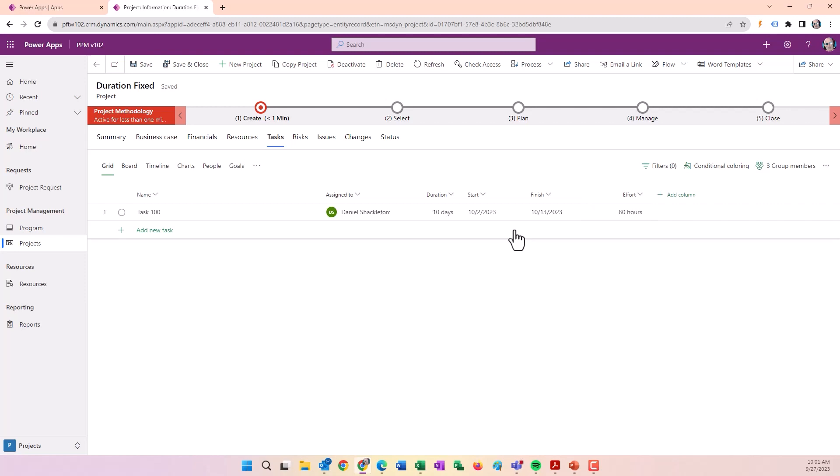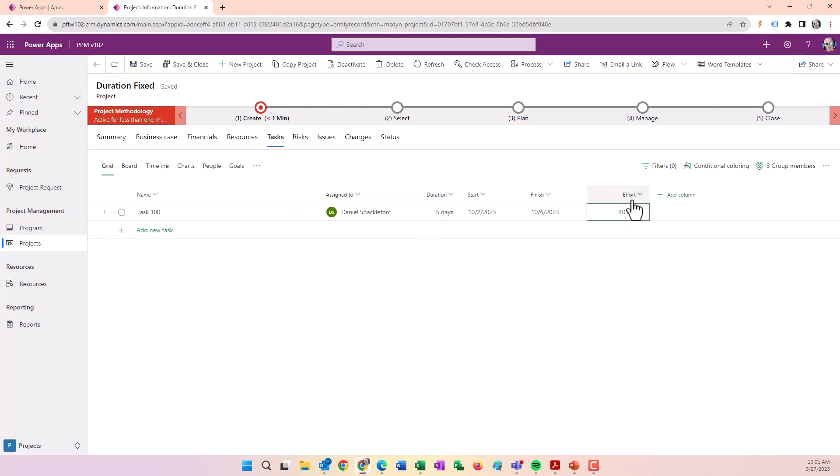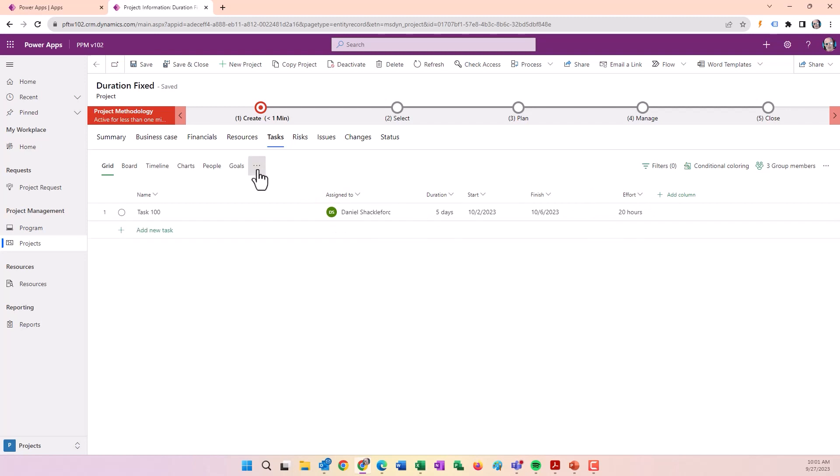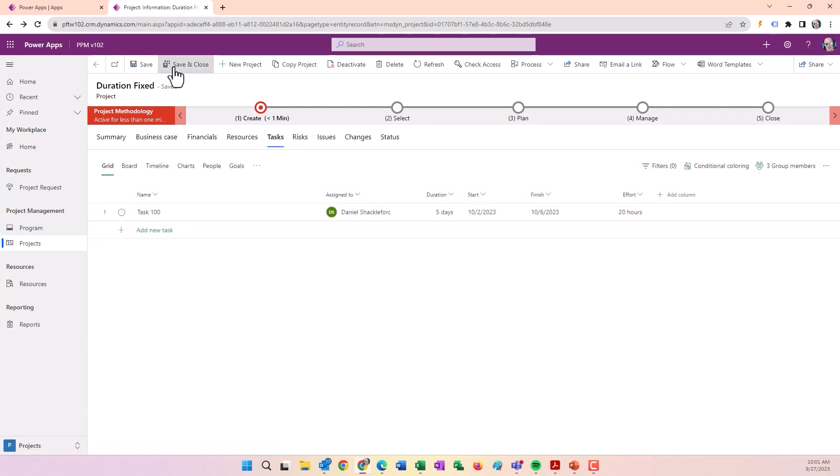If we change this to five days, it's going to change the effort to 40 hours. The effort follows in this case. But if we change the effort to 20, the duration stays the same and it goes down to half time. Simple example of Fixed Duration.